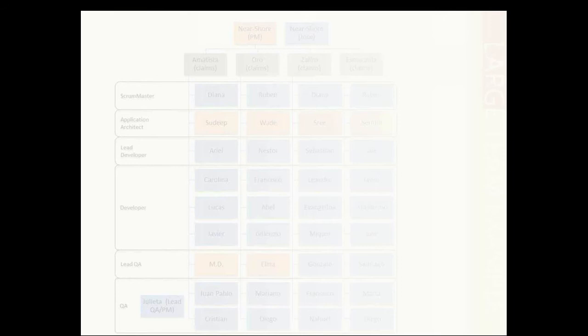So we had our first challenge, and as you can see, one of the things we had to figure out is how to implement Scrum within 30 people. One of the points of Scrum is that it's designed for small teams, 7 plus or minus 2 people. So according to Scrum, this distribution is not supported, so the following proposal was made.